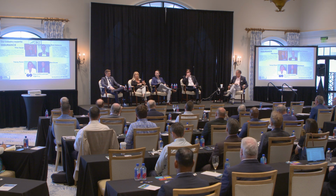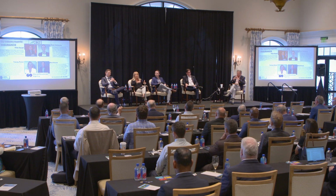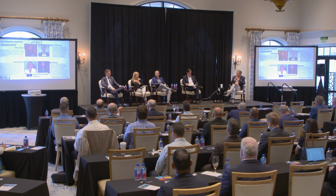And then, a little tidbit to take away if you are doing a capital improvement would be soft costs. It was discussed a lot this morning with both of the panels before us, and that's the hidden piece that everyone always thinks about. It is the extra that you have to endorse on. It is going to be a premium charge, but that is what matters when you, heaven forbid, have the claim. Blows away, roof collapses, whatever it may be, that's where you're going to say, now I have to extend a builder's risk another year for another $200,000, or I have to pay interest or permit fees or whatever it may be. Where was that money if you didn't have the soft cost built in there?